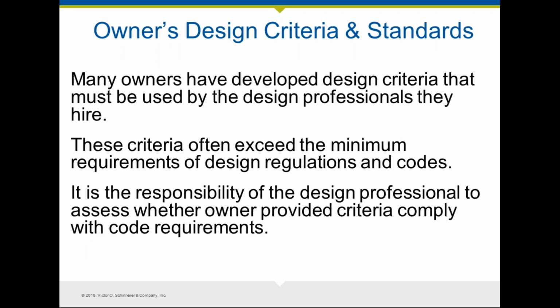The owner, of course, may have their own design criteria and standards, especially if they're operating a large facility or a campus. They may have their own minimum requirements that may well go beyond what the county requires. For example, oftentimes if you are tearing down a bunch of trees, there may be a tree replacement plan that you may need to be aware of as far as the county is concerned.